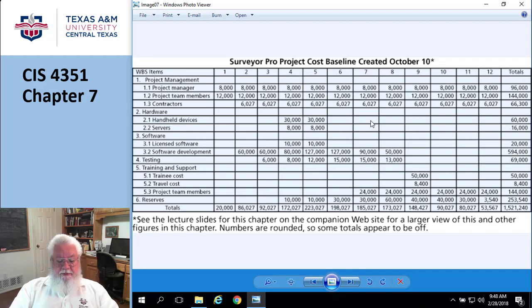Okay. So on page 282, they talk about monitoring the costs using a baseline. Gee, we've heard that before, huh? And the baseline is just like we just talked about. I need to have, here's how much I think it's going to cost per month, and I'm burning through it faster or I'm burning through it slower, whatever. Okay. So you need to be able to produce these updated cost forecasts for every approved change request.